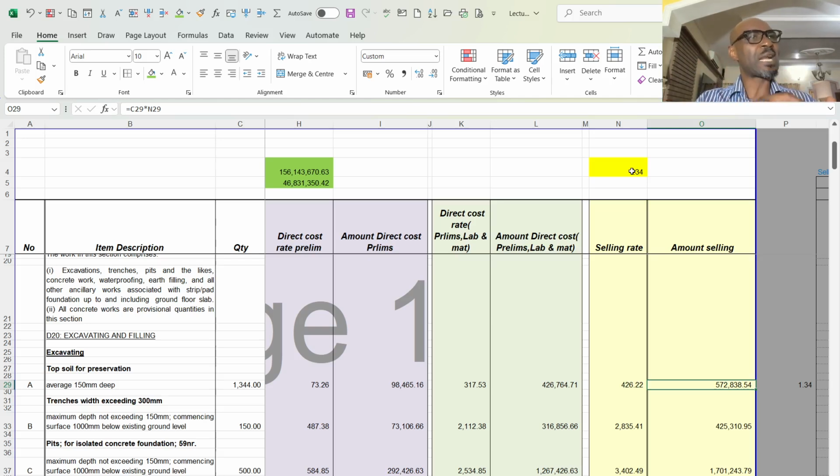So you have technical risks during the course of carrying out projects. You can form a formwork, and during casting it will give way, and you may have to bring down the concrete and recast it. So all of those risks that you will come across during the course of this project, if you don't make some amount available so that you can draw from there to take care of those things, you are going to be drawing those costs from your profit. So I want to take us to a sheet where I did a breakdown for it.